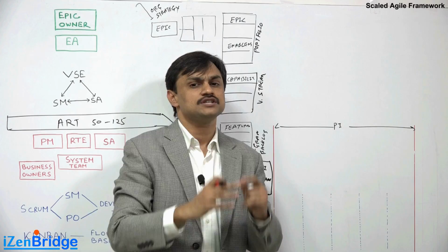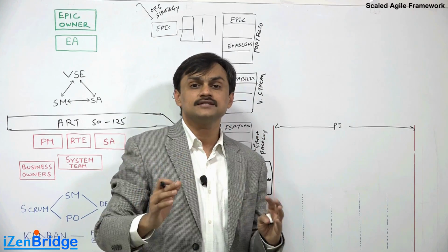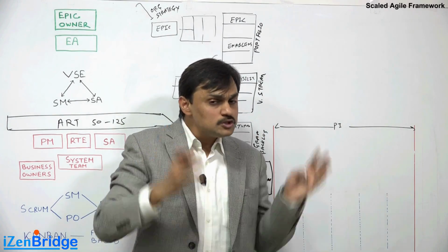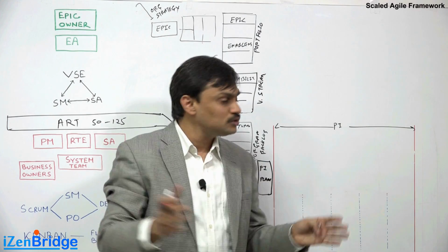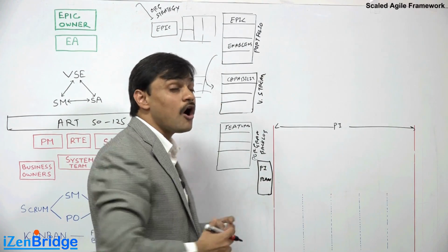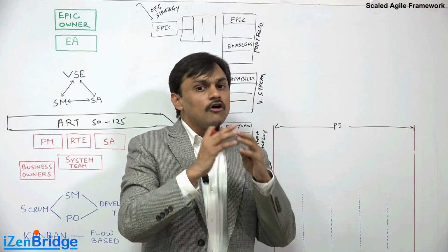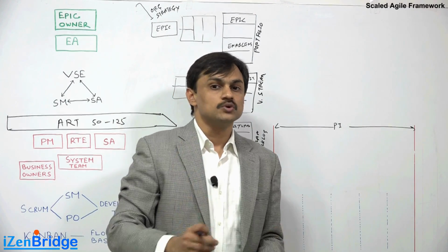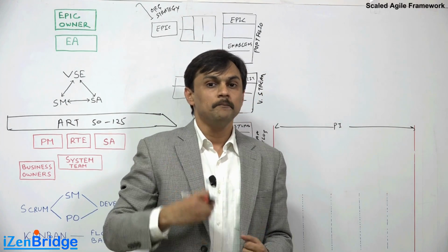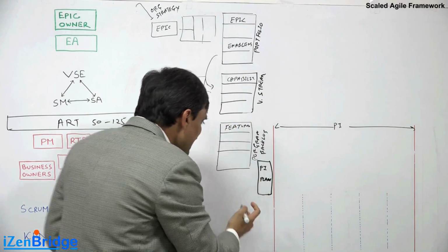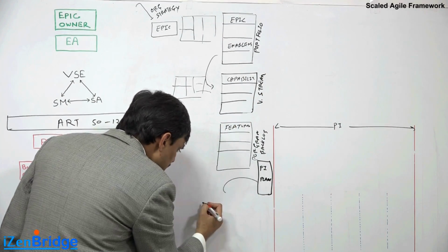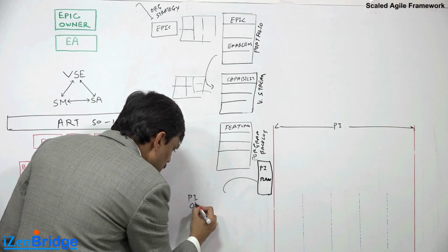of breakout sessions, which has lots of interdependency identification events. We also do our capacity planning, and we figure out what all from this program backlog can be done in this 10 weeks window. The result of this exercise is something called team level PI objective. So once we are done with it, each team will get a PI objective.